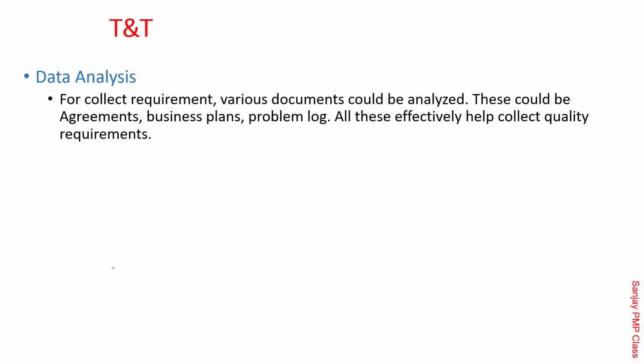Data analysis is obviously required. Once you capture the requirements, you analyze the agreements, business plans, and problem logs. Sometimes you look at the prior version and see what all the complaints are. If you are going to upgrade something, you will take the problem log or issue log. If it is a white goods product, then service center details. Is that correct, friends? Are service center details useful for the people who are working on a new model of car? Do they need to get in touch with the service center?